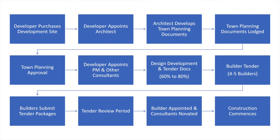A developer then appoints a project manager — sometimes they run it themselves — as well as other consultants. Design development and tender document process commences. The percentage of design development varies depending on how much the developer wants a say in the design; generally it's higher, but a lot of the time it sits between 60 to 80%. Then it goes out to builder tender.